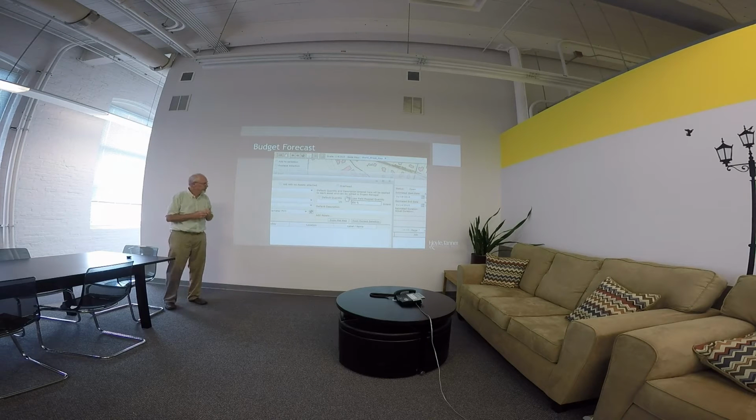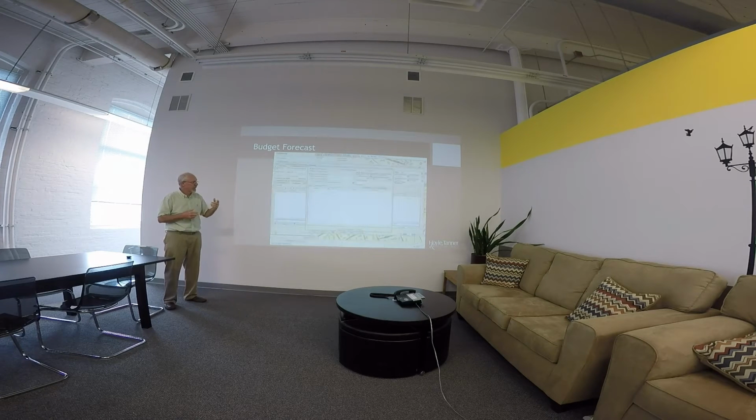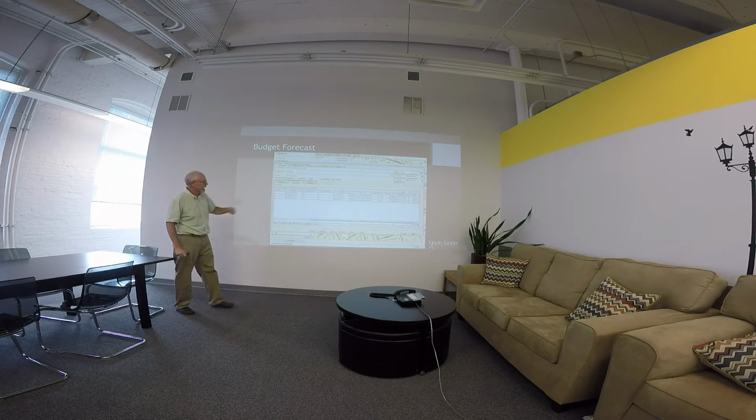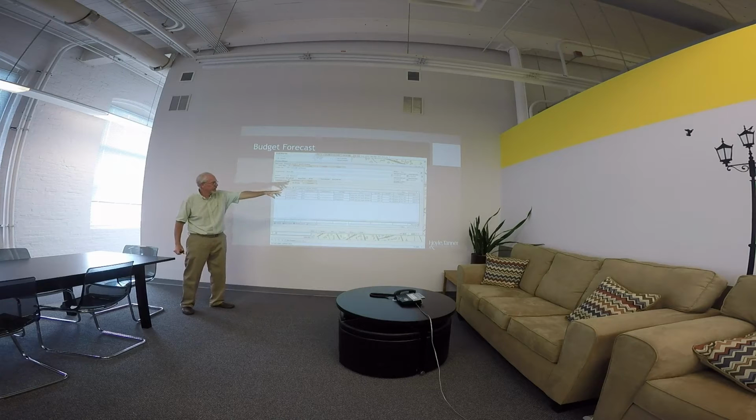And what I'm going to do here is use the measurements from the current selection set, the pipes in the selection set. It's actually going to get all the pipes from my selection in the risk module. Okay. So it'll start calculating your capital improvement budget directly from the map. It brings those pipes in, applies the values according to the length, calculates the cost, and then it has the unit cost, and the ultimate replace cost of those pipes is $12,000 right over on the end here. 20-inch pipes, as you can see.